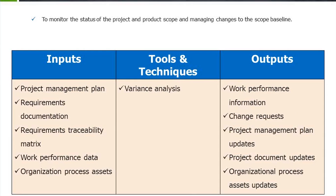The next stage is control scope — to monitor the status of the project and product scope and manage changes to the scope baseline. Inputs are the project management plan, requirements document, requirements traceability matrix, work performance data, and OPS. Variance analysis is the tool and technique. Outputs are work performance information, change requests, project management plan updates, project document updates, and OPE updates.